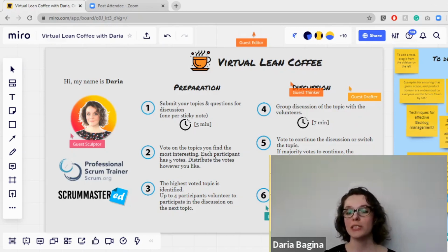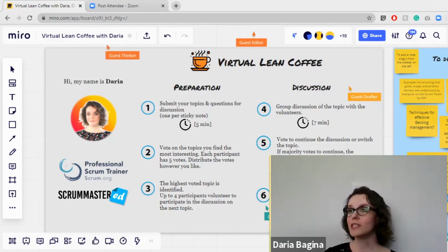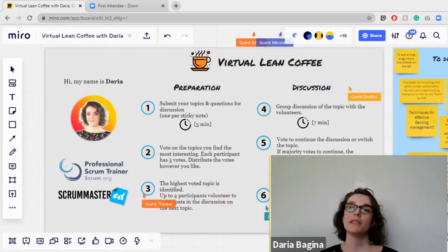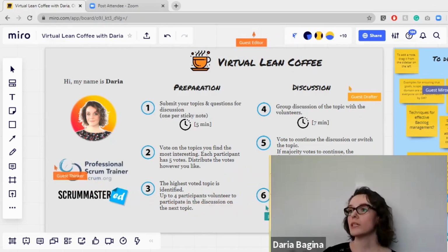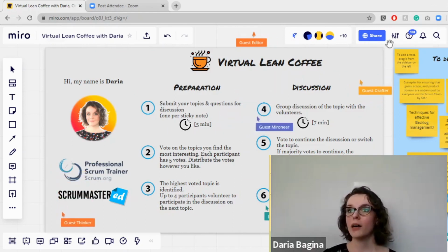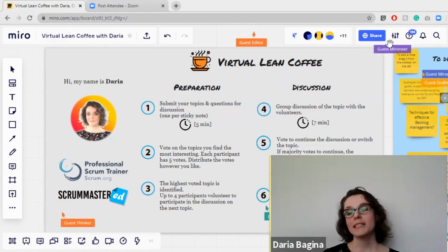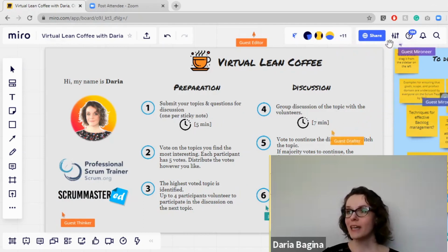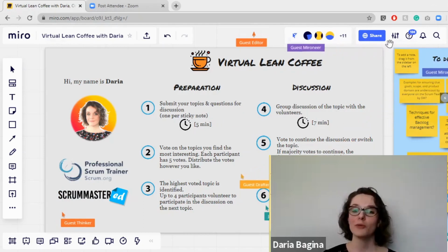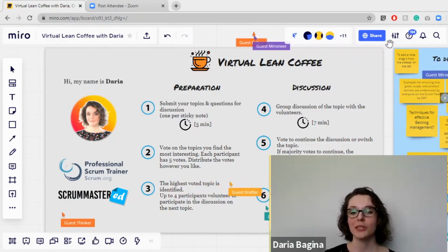We generally do the time box of 8 minutes, 5 minutes, and 2 minutes if you want to continue discussing. So first time you discuss this topic for 8 minutes. At the end of 8 minutes, everybody can vote whether they want to continue discussing this topic or not. And then you might extend the time box up to 2 times. In this case, the way we'll do it, we'll do 7 minutes, then we'll vote, and then we'll do 4 minutes if we decide to continue.